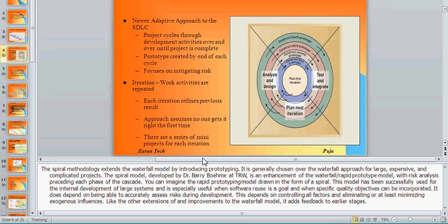So if we don't finish with iteration 3 or release 3, then it's more because of the business than because of us. As far as we are concerned, we are being evaluated per iteration. Did we deliver what the project success criteria were for that iteration? All right? Does that make sense?